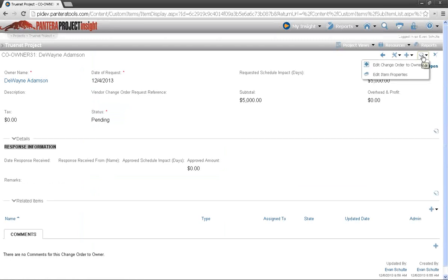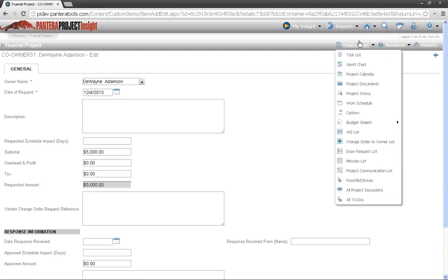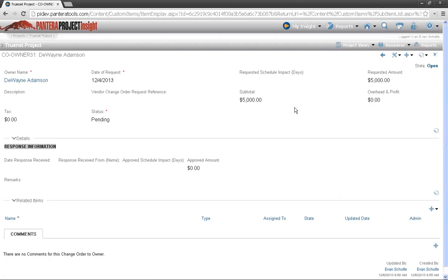Because we have different potential change orders for every project we work on. For simplistic sake, let's just say an integration. We could do on one project 15 of these a day, and 6 of those we couldn't complete for some reason or another. So we go to the site, something's not ready, and we change order the customer for a trip charge and an hourly rate at a certain amount. We have to submit that to the customer at the end of the week, and when we're really smoking on some of our bigger projects, it could be 30, 40, 50 of these a week, up to 60.